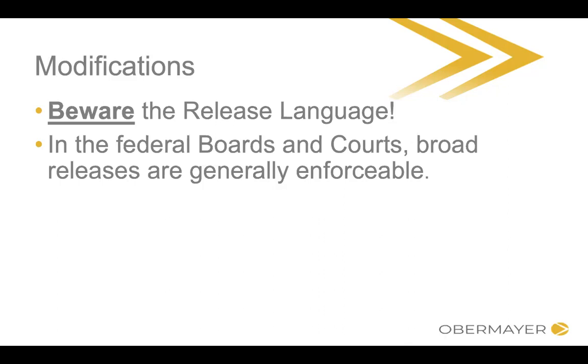Another time it comes up is sometimes you tell the government that this issue has come up, and the government goes, oh, I totally understand. How much time do you need? 3 months? Okay, great, we'll give you a mod for 3 months. We don't have the funding right now, but we're going to get it later, and then we'll issue another mod. But in the meantime, here's your mod for the 3 months. And then you go to the closing statement and it's got that language. If you sign it, you're not getting the money later, or at least the government could argue that you waived your right to the money later.